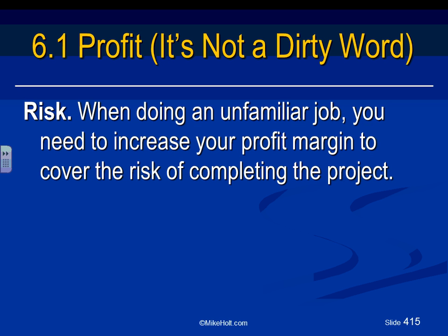Risk. If you're doing an unfamiliar job, guys, you're supposed to get a little bit more profit to cover any unexpected things that you have not covered in your project. Because you're taking a risk, you need a little bit more profit. With risk goes a little bit more profit. Any question, guys, about the impact of risk on profitability? Aaron, my friend, does it make sense? The more risk, the more profit you should assign, at least based on those gentlemen.